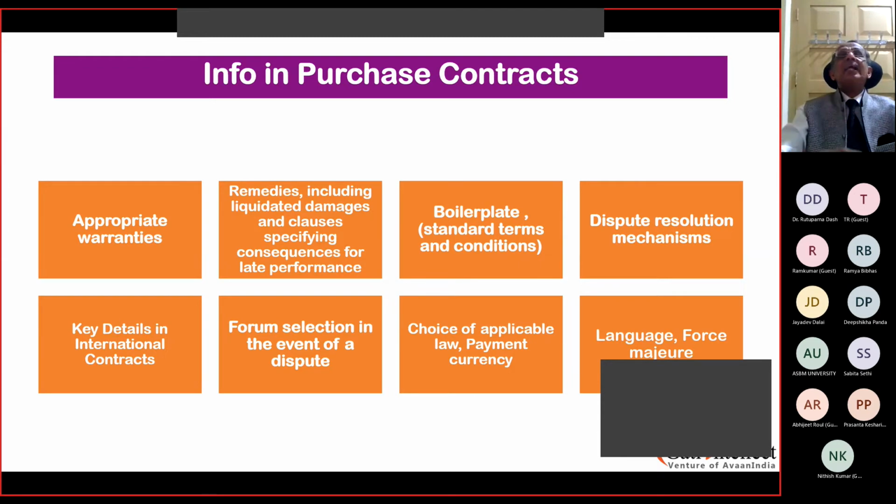But then it has to be specified properly. Installation means, what are the things involved? Is the company supposed to provide the tooling for the machinery? How much is given by the supplier? How much has to be bought? Who will install these machineries? Will an engineer from the vendor side be flown to, let's say, Dubai for installation?